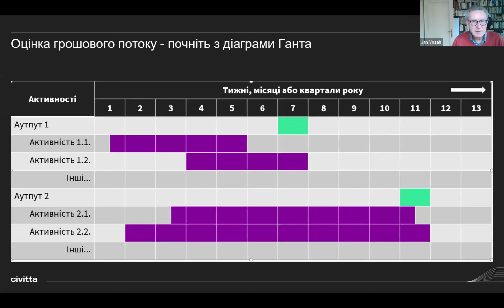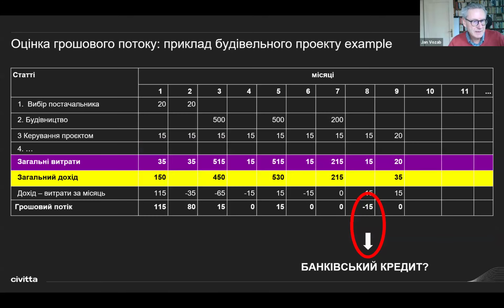And because in the previous budgeting exercise I have just described, you have all the activities described in financial terms. You know how much each activity will cost you. And since in the Gantt chart you know how much of the activity you will carry on every month, you can calculate the amount of money you need per activity per month.